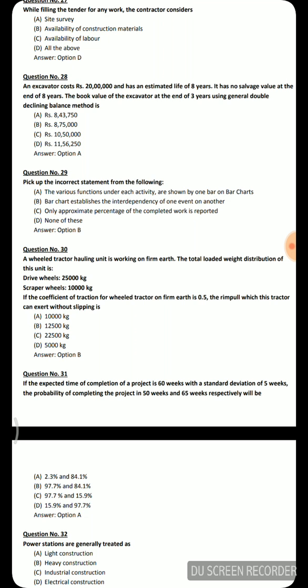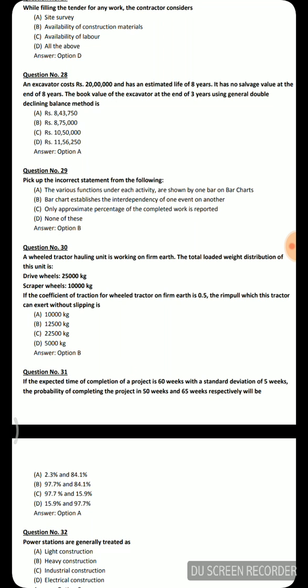Next question — read carefully, it says pick up the incorrect statement. Option A: various functions under each activity are shown by one bar on bar charts. Option B: bar chart establishes the interdependency of one event on another. Option C: only approximate percentage of completed work is reported. Option D: none of the above. The correct answer is option B — bar chart does not establish interdependency of one event on another.